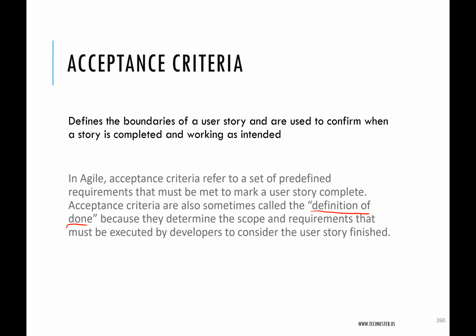You are talking about organizing all the different features or tools or parts you have created. That rule of how to organize them will not go into any single acceptance criteria. So that is more like an acceptance criteria for the entire increment.